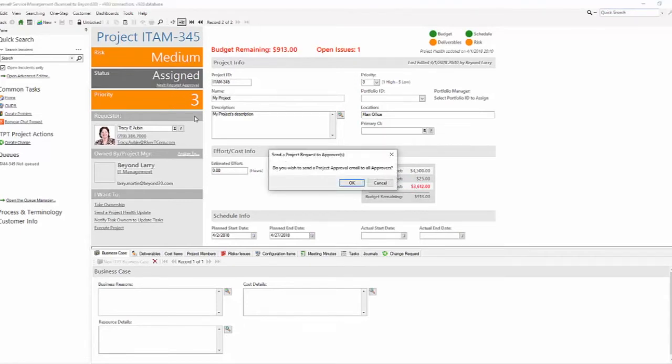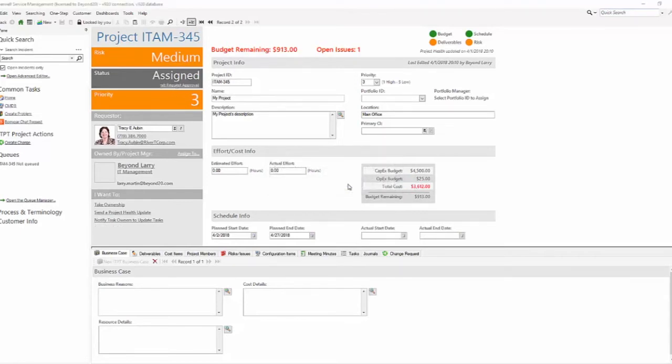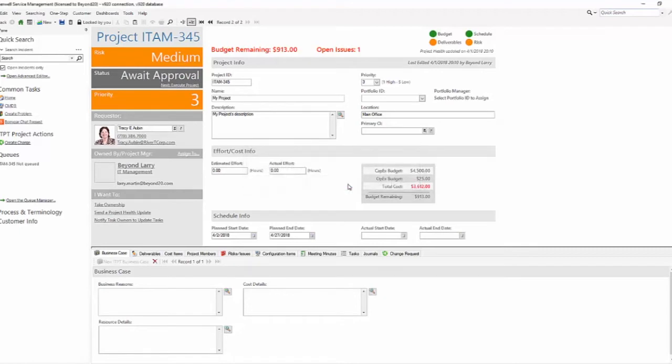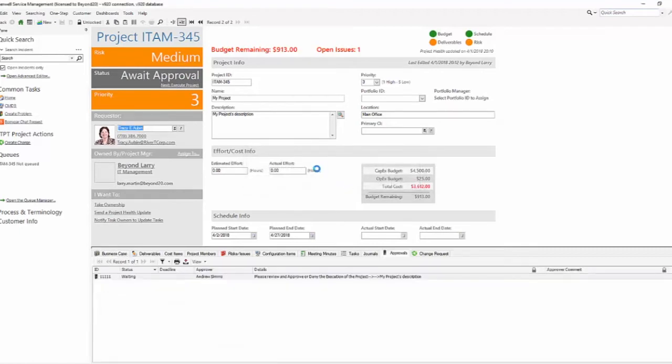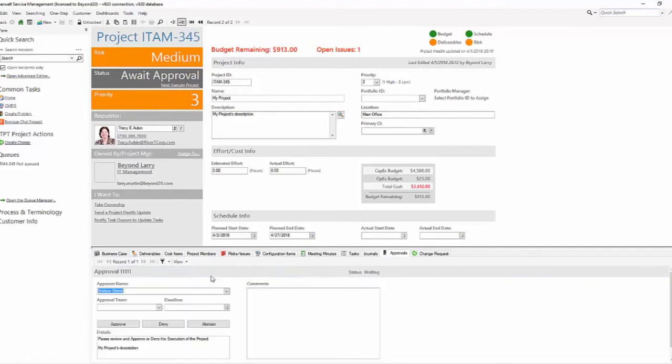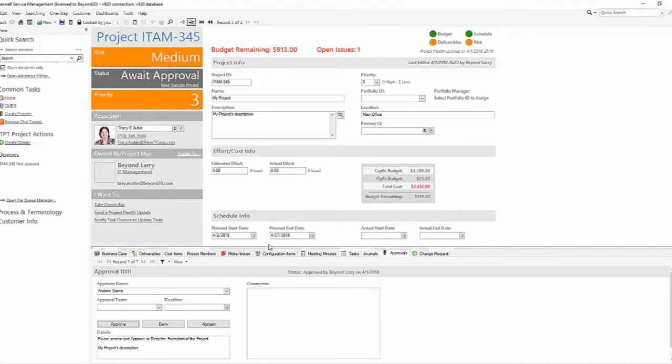To get that to move forward, you need to actually have gotten approval. The approval is going to go out to those who have been identified as approvers. You'll see here now that we have approvals. We have Andrew Sims, who was identified as an approver, and I will show you that in just a moment. Andrew would come in, approve the project, and now that it's been approved, it'll move forward. We can move it forward into execute and set it as active.